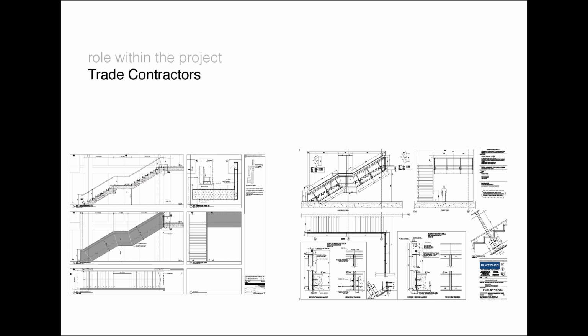And then the trade subcontractors reinterpret what we've done based on how they're actually going to build it. So they produce their own drawings, shop drawings, which they then submit back to us for comment. It goes through a digital system, so they upload it onto the internet, and then we can download it, comment on it, and send drawings backwards and forwards.